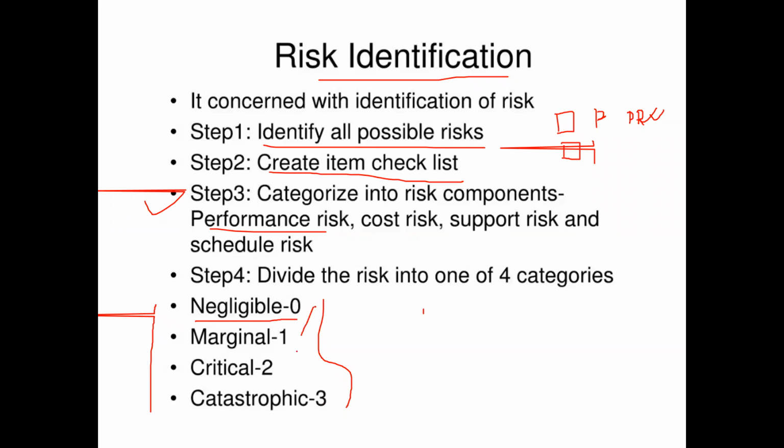So whether you give impact in ascending order or descending order, that's up to you. But you have to assign one impact factor to each and every risk. How is the impact factor decided? If the first risk is very harmful for your project, sometimes that risk may cause your business to fail, then that is catastrophic.